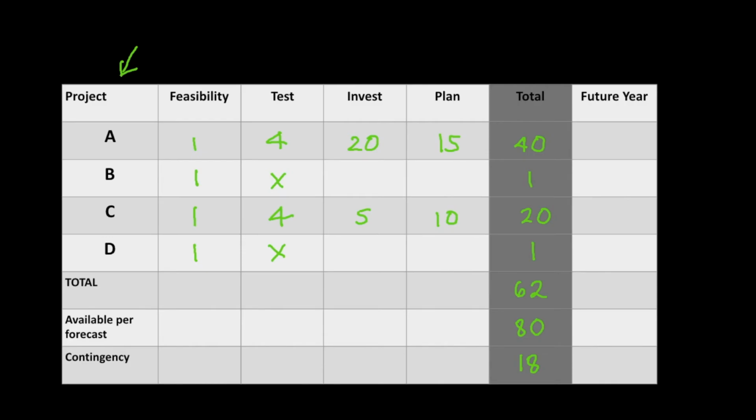Notice also that this approach allows us to commit in future years where we've got a multi-year project in a way that isn't possible with traditional budgeting, which looks exclusively at the current financial year. So those people managing large multi-year projects can execute with confidence that they're likely to have the resources they need to complete the job. In this way, we can spend the right amount at the right time based on knowledge, avoiding risk and helping us to exploit opportunities, unlike the traditional big bet approach where we're fully exposed to the risks in an uncertain environment. It allows us to be flexible, but also to retain control.